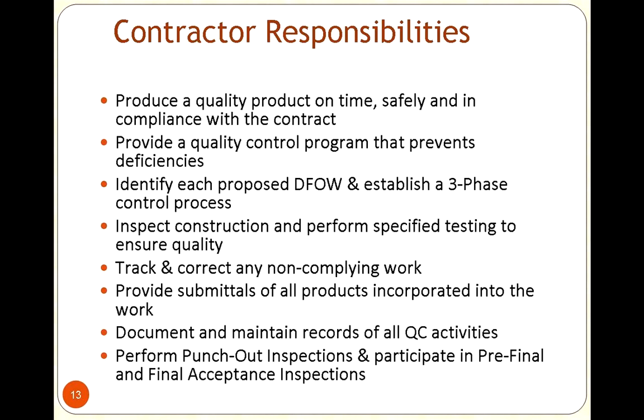One of the other records that you're going to want to take a look at is when we're at the end of the project, we need to make sure we do a punch out, make sure that everything that we're looking for is taken off the list, so that way we can have a final acceptance and be able to document that, yes, we can pay you. You did A, B, C, D. We've checked it. We've punched it out. We can now feel good about cutting you a check.